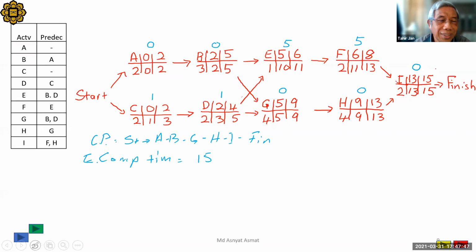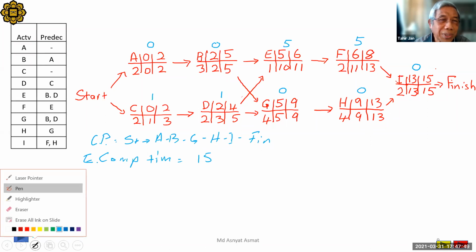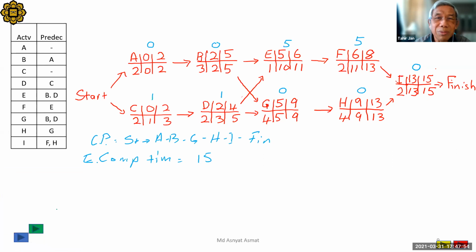Okay, what are we doing? We are doing PERT, remember? PERT, Project Evaluation Review Technique, is a probabilistic method. So let's find the variance for the project. The variance, we have to take the sum of the variance of all the critical activities along the critical path.